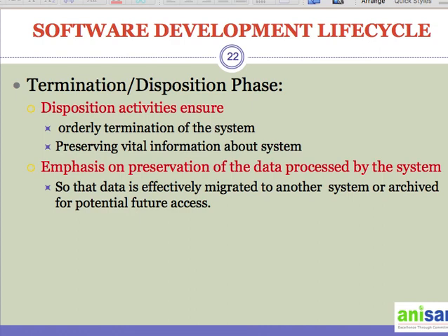Now disposition itself is a mini project, so you have to identify how you want to dispose of it. You have to appoint a project manager for that. Then you have to inform your business stakeholders, vendors and customers that we are planning to dispose of or terminate it, or it will no longer be available. So this is the first step, to inform. Once you decide, it is formed as a project and goes as scheduled and planned. The first part is communicating with the business stakeholders, including the customer, that it will not be available. If there is any billing cycle, allow the customer to complete one billing cycle, and also give them enough time to make alternate arrangements. That is one part.